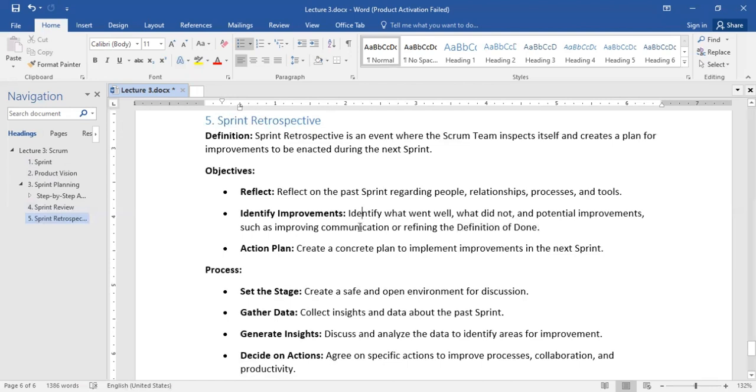So one of the things that happens in the retrospective meeting is to say, okay, in future communication, rather than just making it broad and generic, and saying that when we complete a user story, that's when we are done, why not say that whatever user story will be completed has to be tested, or micro-tested, to be sure that it is working and satisfies the objective before it is brought in as done? You get what I'm trying to say? So when you do that, it's more specific, a little more narrow than when you just make it broad.